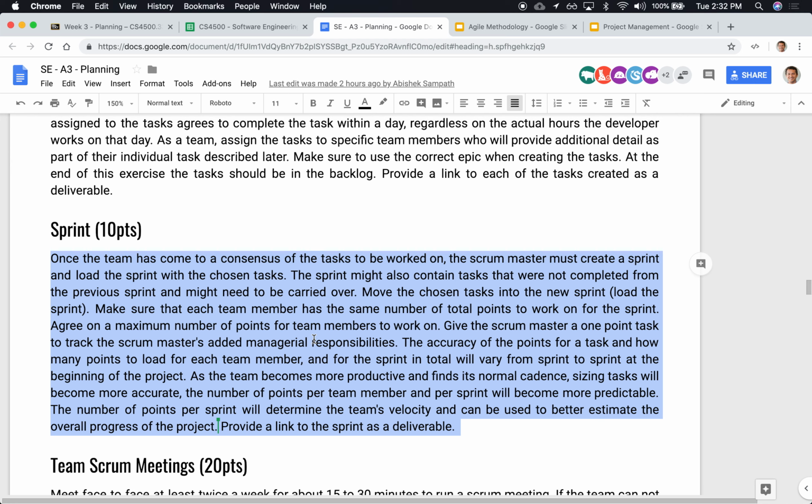And the Scrum Master should challenge the two. They should challenge the smallest point, and they should challenge the highest point. They should challenge the one that says it's a 1-point story and ask, why do you think it's that easy? And they'll say why they think it's easy. And they'll challenge the person who's saying it's so hard.